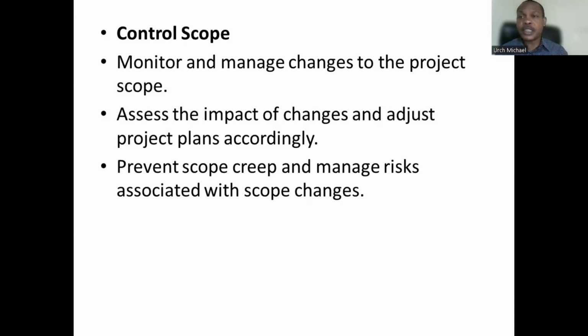So even if you have to make a change, you still have to go through the integrated change control like we discussed before. You need to consult with the stakeholders. You need to consult with the project owner. You need to consult with affected stakeholders and see how you can actually get buy-in from them. And whatever decision is made in terms of making changes in the project will have to be generally agreed by all before such changes can be made. And once that is done, the version of the project management plan will need to be updated so that everyone will be in the know about the changes that have been made. And also you need to assess the impact of changes and adjust project plans accordingly, just like I just said.